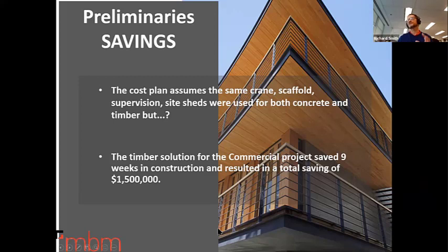And there were some anomalies, of course, but that would have come out in the wash if we got down to negotiation. And I think, certainly as a QS, we predicted about 8 weeks. The builders were saying about 9 weeks saving. So that was comforting to see.